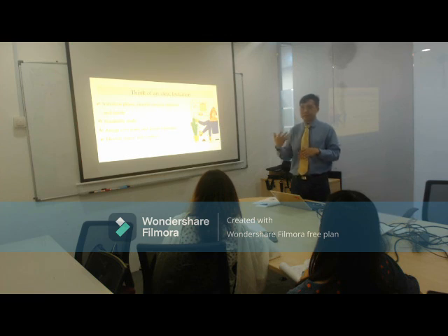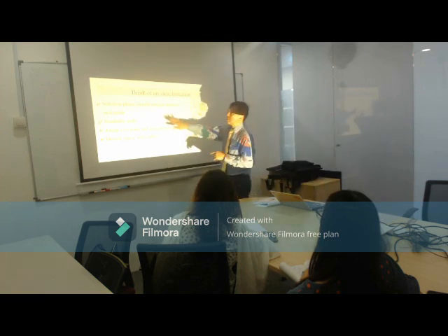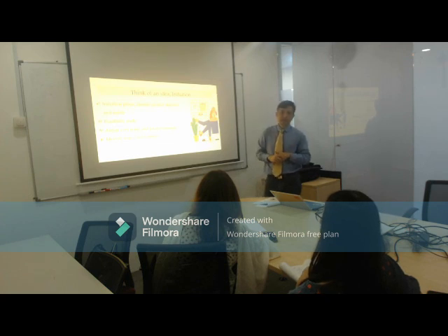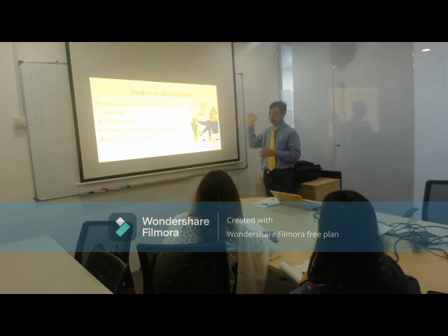Okay, coming back here to our paint job. We decided that, oh look, after calculating this, I don't have enough money for the aircon. And the aircon requires me to break holes in the walls and all that. I have to go and apply to the management and all that. Aircon is out of the project. Buying new furniture here and there is also out of the project because there is no budget for that. The only thing left was I can do the painting of the whole room to make it look nice.